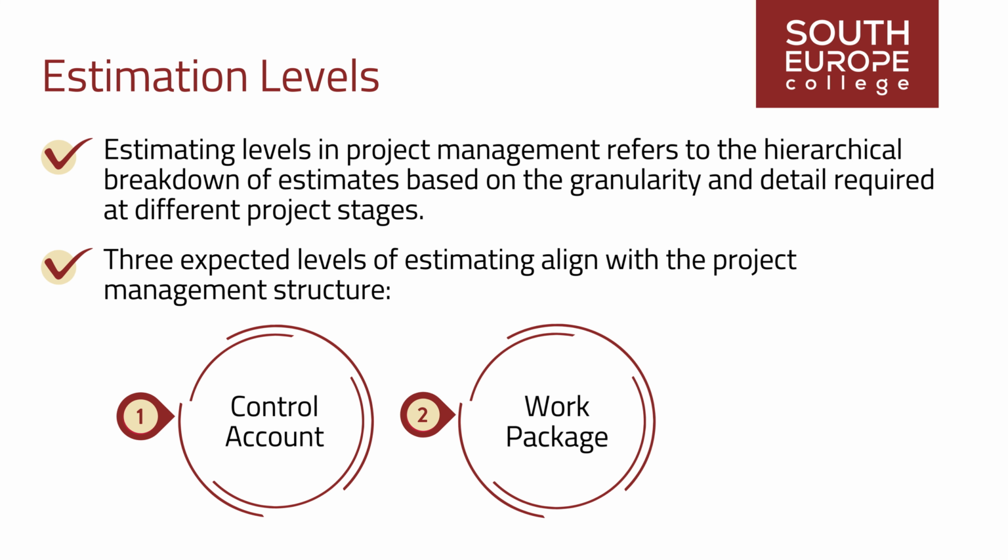2. Work package. A work package is a more detailed level of the project breakdown, representing a specific set of activities or tasks within a control account. Work packages are the building blocks of the project. Work packages are used for detailed planning, execution, and monitoring. They provide a basis for assigning responsibilities, managing resources, and tracking progress more granularly.